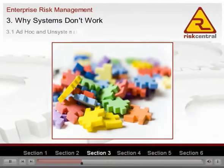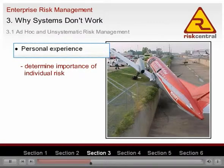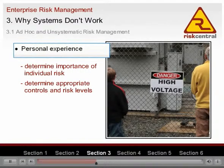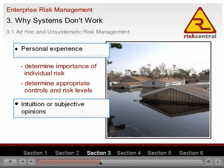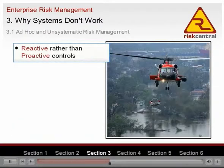A lot of traditional risk management has been based on ad hoc or unsystematic methods or approaches. These include relying on personal experience to determine how important individual risks are, relying on personal experience to determine appropriate controls and appropriate risk levels, relying on intuition or subjective uneducated opinions to determine how important risks are, thinking that insurance equals risk management, and having an emergency response plan that relies on reactive rather than proactive controls.